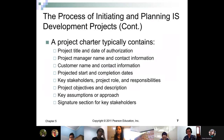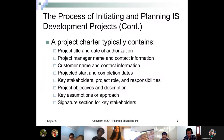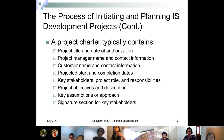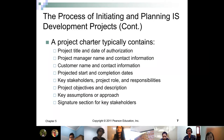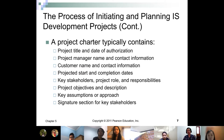A project charter typically contains: the project title and date of authorization; the project manager's name and contact information; the customer's name and contact information; project start and completion dates; key stakeholders; project roles and responsibilities; project objectives and description; key assumptions or approach; and a signature section for key stakeholders showing their approval of the project.